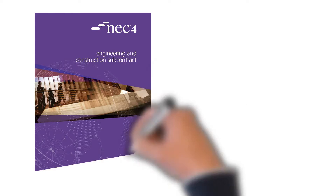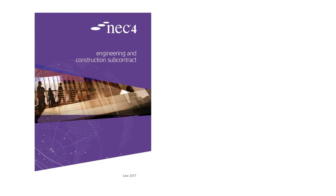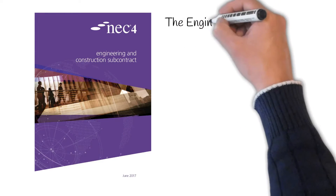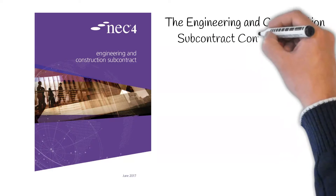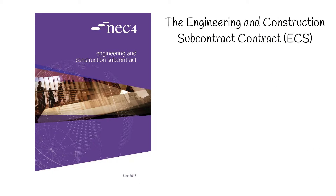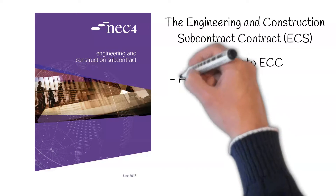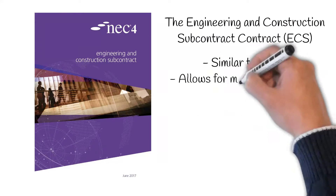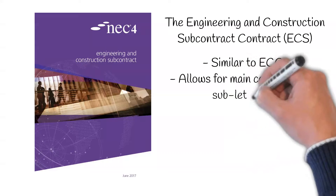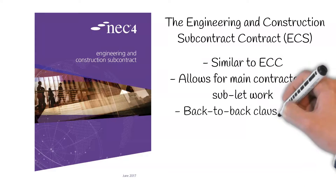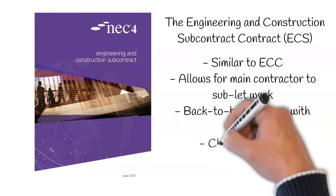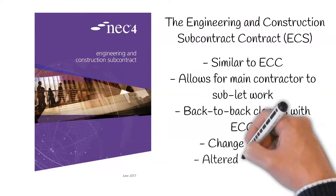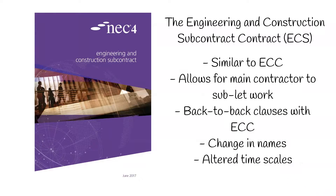The Engineering and Construction Subcontract Contract, or ECS. This contract is very similar to the above. However, it allows for the main contractor to sublet part of the project to a subcontractor. This allows for back-to-back clauses. The only difference is a change in names, i.e. contractor and subcontractor, and the timescales are altered to facilitate the timescales required in the ECC contract.